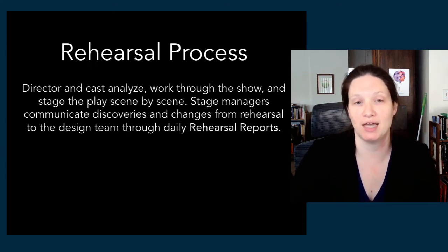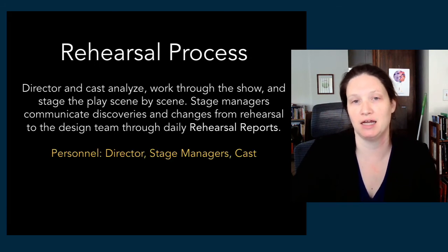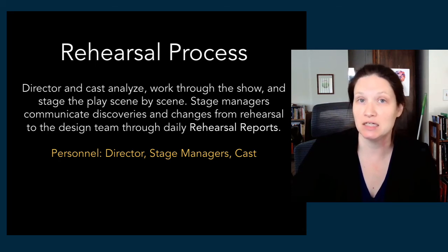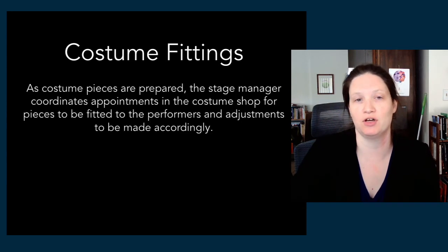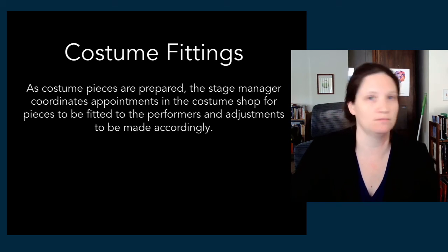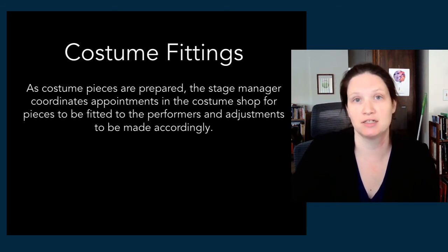The stage managers communicate anything that is discovered or changed from the rehearsal to the design team through daily rehearsal reports. And so typically in our rehearsals, we see the director, stage managers, and cast. Often designers are invited, but they are not necessarily present at every rehearsal. Simultaneous with this rehearsal process, you'll have costume fittings, and those are scheduled by the stage manager and the costume shop so that the performers and actors can be fitted and adjustments can be made based on what they need the costumes to do in the rehearsal process, and also just the tailoring to fit actors as we go.